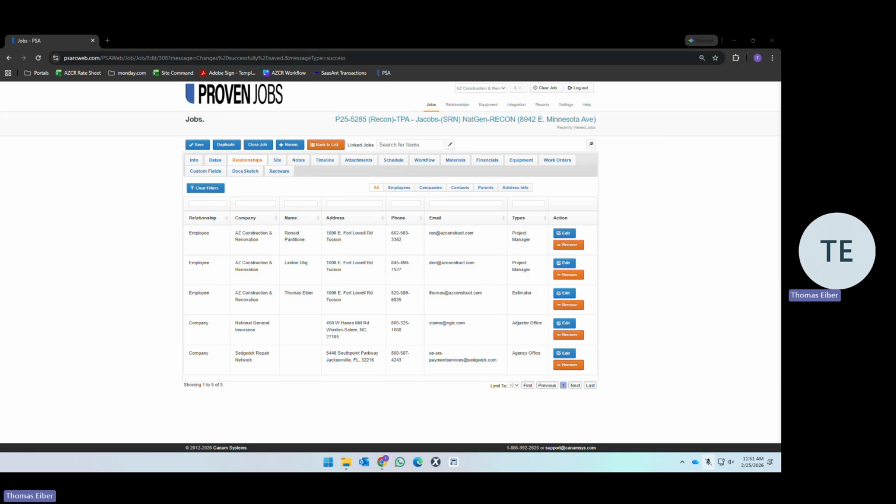Work progression is also a deliverable that you're giving out. Mainly it is operations that is going to be receiving these updates. You're going to give them the progress on the work, letting them know what happened, what is happening next, when the completion can be expected. Field reports, again, to operations. Every time that you visit a job, you're taking photos and providing some kind of field report. Doesn't matter if it's a field report that's just photos of the progress saying on schedule, no changes, or if it's something more complicated where something needs to change. Field reports are a deliverable from you.